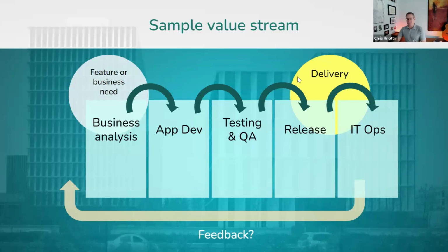If we don't have any chance of realizing value until after delivery, then if all of this stuff in the front end took 10 months or a year and a half, man, that's a long time not to be getting value. So if we can understand ways to shrink this cycle time, shrink it more and more, then we have an opportunity to produce value faster.